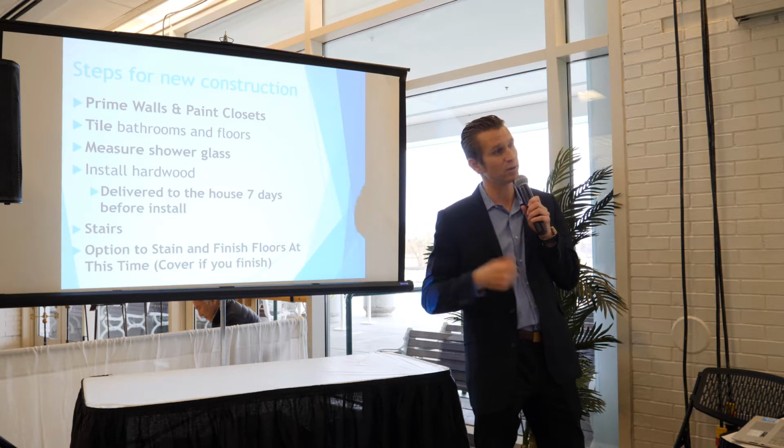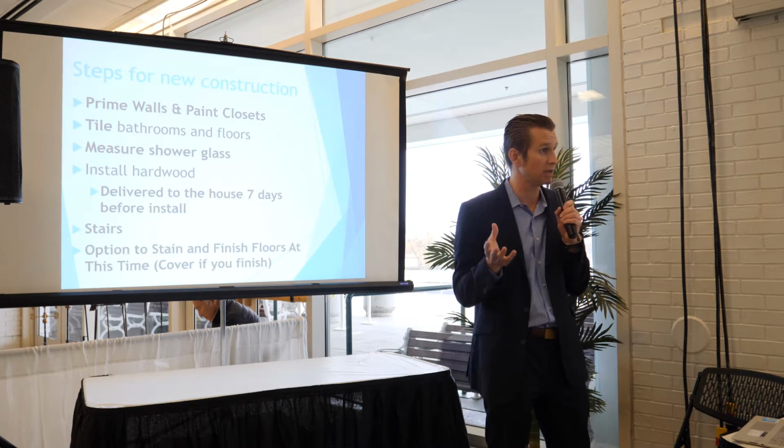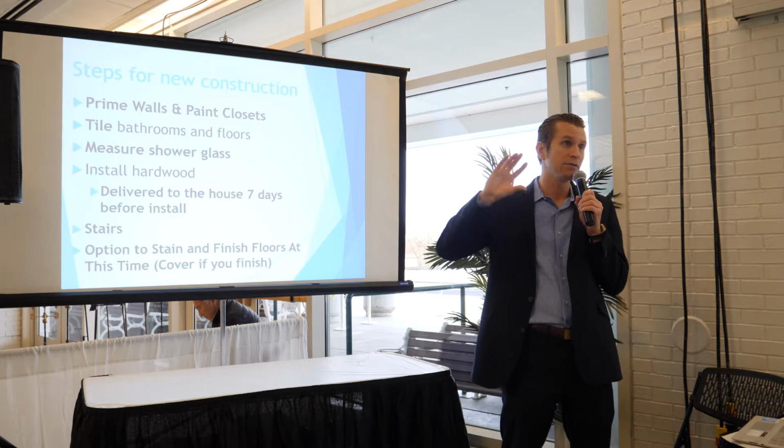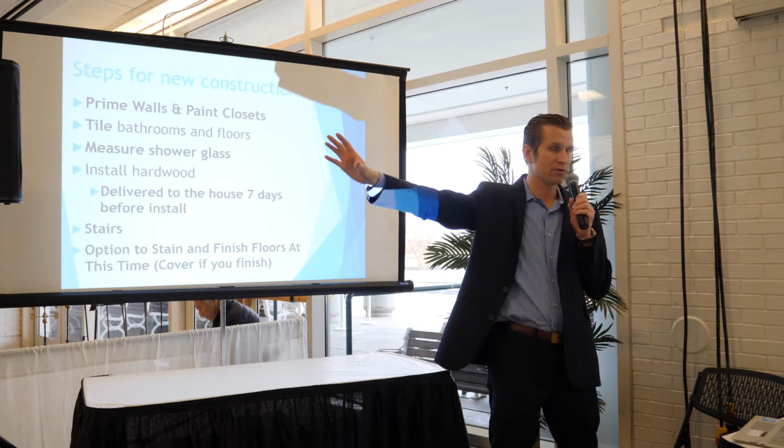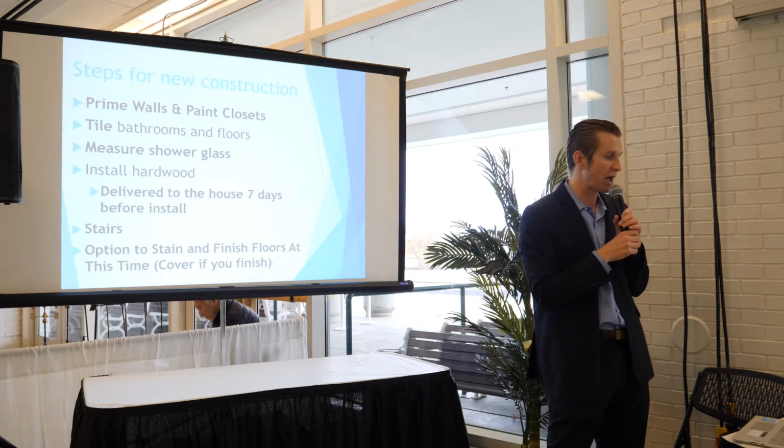Framing contractors typically don't do stairs. They're a very specialized contractor, and so these guys are extremely busy. So make sure you get them scheduled early in the process.